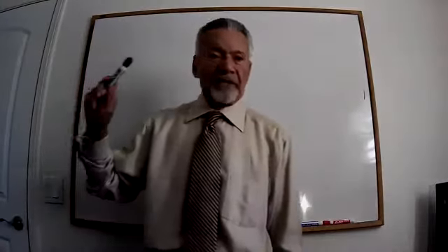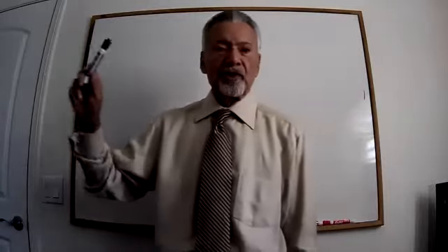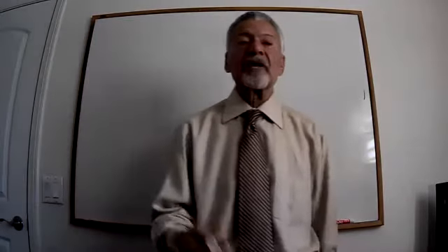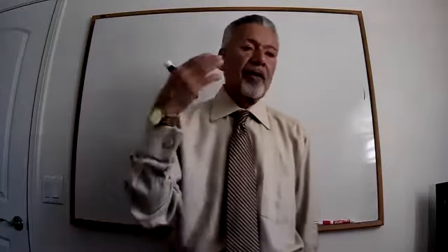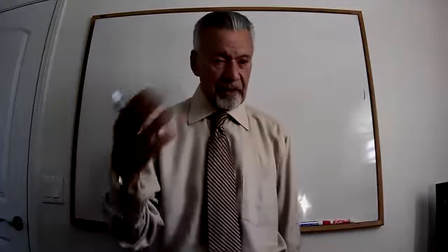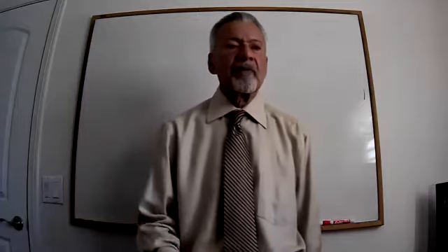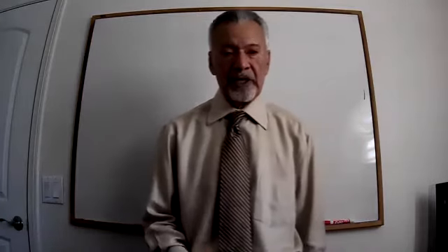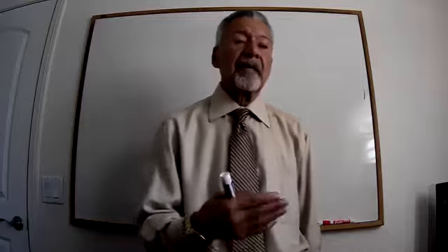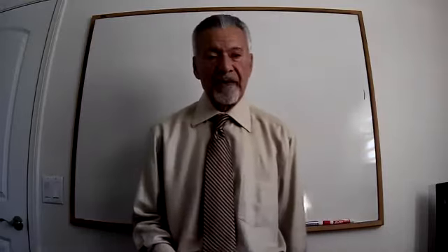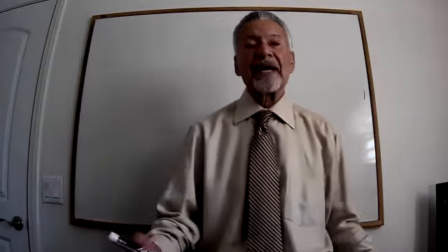When you graduate, your boss will send you to a meeting and say, hey, there's a meeting for so-and-so project. I want you to go there and come back and report and let me know what happened. So you go there, you write the notes, you come back and write the meeting minutes. The meeting minutes contain, number one, the title of the project. Number two, who were in that meeting? Number three, what was discussed? Number four, what are the action items?